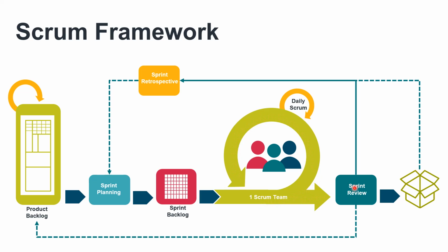In the end, we approach a sprint review meeting, and this is when we demonstrate our work to stakeholders, we collect their feedback, and we discuss some adjustments for the future. And we can even come up with new requirements, which we can store right in the product backlog.